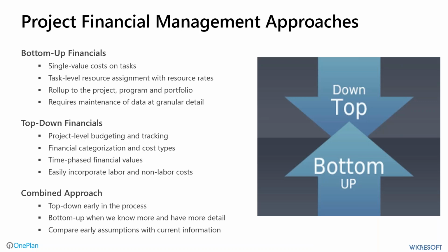And then these elements could then roll up to a project level or a program level or portfolio level from that granular detail. The challenge with this approach is that it requires maintenance of data at a very granular level of detail, and people need to do that consistently at that level in order to maintain it from the bottom up.